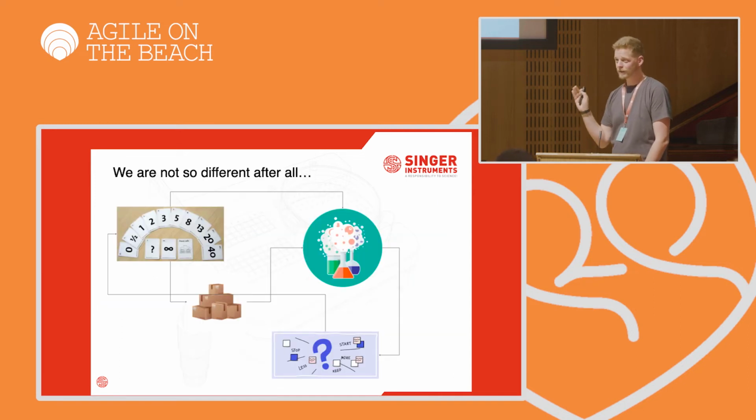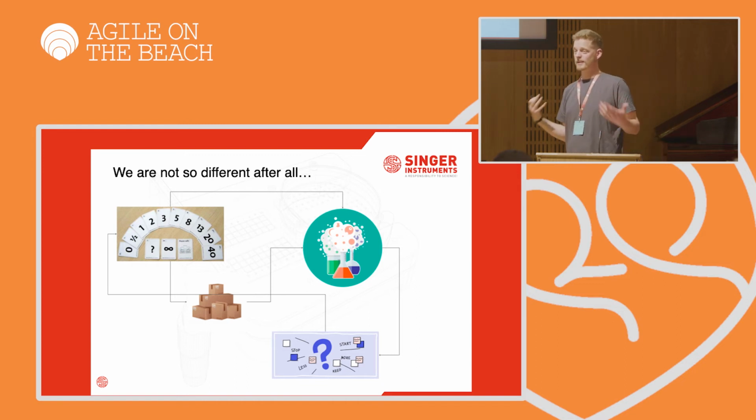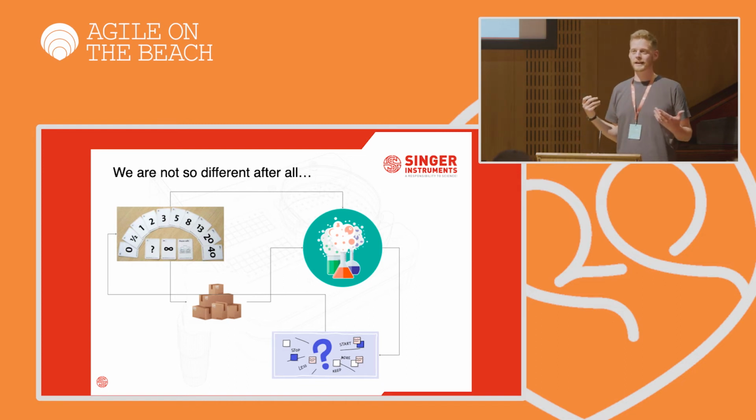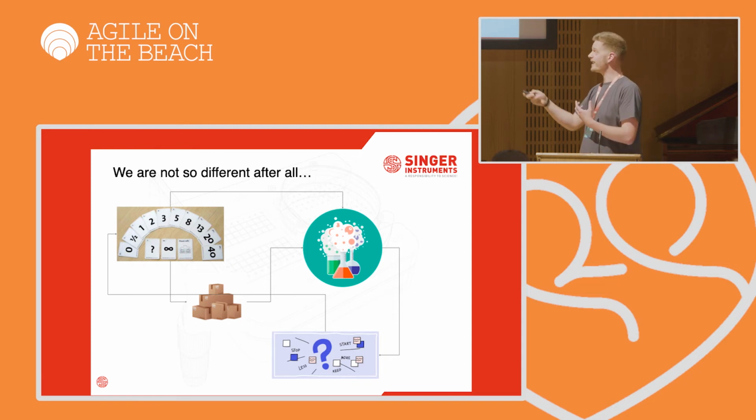And other than that, everything we were doing wasn't so different from all the other agile talks you'd have. We were meeting and doing effort scoring, and we used effort poker because that was something we learned about on the internet. It worked fairly well. In fact, now the team's pretty instinctive, and we're pretty in sync with how hard we think something is. So we don't have to go through effort poker all the time. But if we have a new member of the team, or an intern comes in, it really helps to go back to basics and teach them how we do effort scoring.